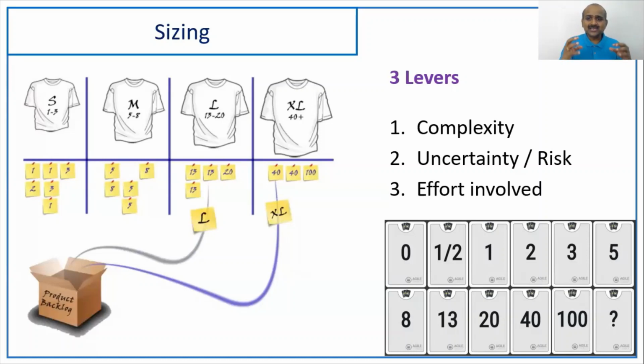So what is a story point? A story point is a relative number compared to a specific story. If I consider this as 2 story points worth of work, compared to this, how much does this story look like? Effort wise, it takes double. Okay, 2 to 4. Then complexity wise, same, but risk wise, it takes a bit more. Okay, 5. So 5 story points, I will take it. So what are you doing? You are relatively estimating the effort, the complexity, and the risk to arrive at it. And it's a quick way of arriving at the size.